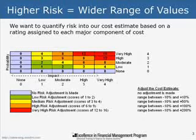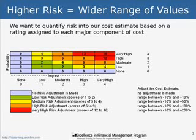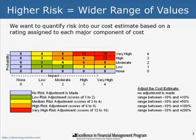We'll assign risk ratings for different components of our cost estimate. The higher the risk rating, the wider the range of possible values for that cost component. For example, if you have no risk at all, there would be no risk adjustment. But if you have an extremely high risk, you could have a cost estimate that might be 10% below the single-point estimate on the low end, but could be as high as 200% of the single-point cost estimate.